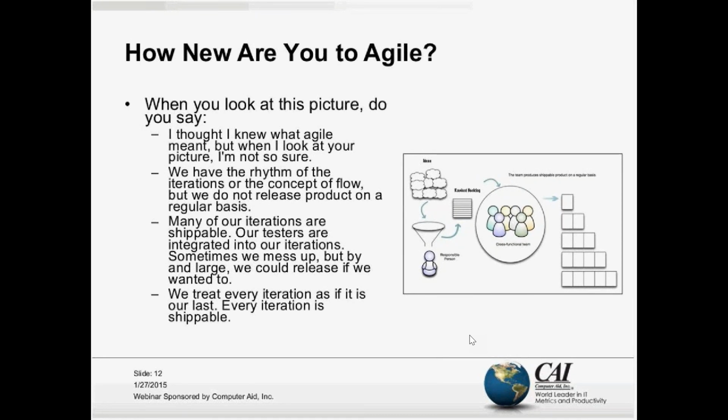After a while, say every couple of weeks, the team reflects on its process and does maybe a formal demo or a formal show and tell to that responsible person. And when that responsible person sees that, they end up creating a new ranked backlog or changing what the team needs to work on next.